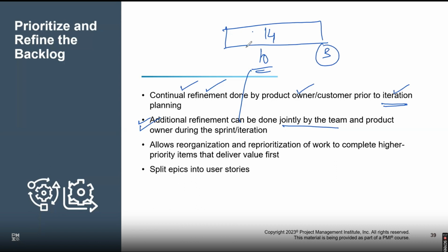We can't end the sprint, because the sprint has to end whenever it is meant to end. You can't end the sprint because we planned 10 and we are done at 10. No, you will go back and do additional refinement. Say, okay, we are done with it. We were faster. So now let's go and reprioritize. We got 3 more days left over. Let's reprioritize, and we can pull up those items we can do in 3 days' time. So we can plan it out when the sprint is going on.